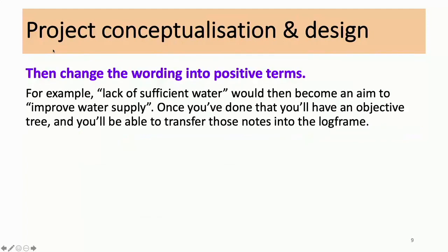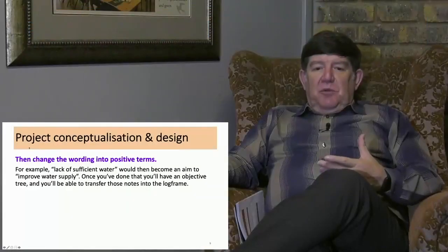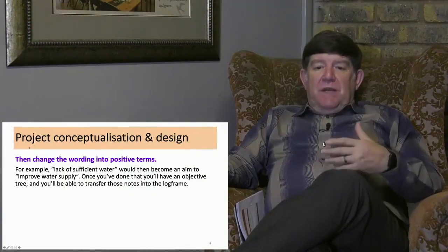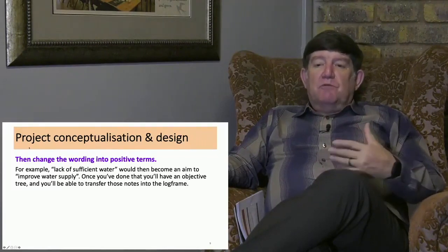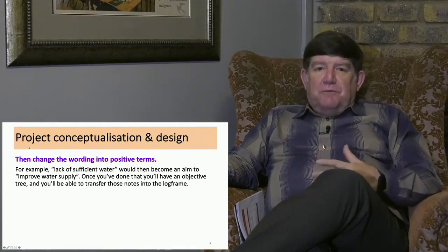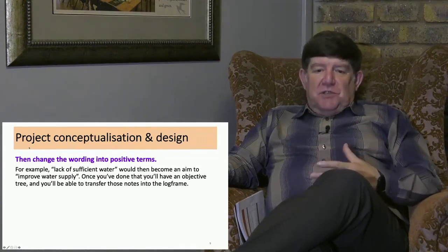Then change the wording into positive terms. You have now started with a problem which is generally negatively formulated. For example, if your problem was lack of sufficient water, it would then become an aim to improve water supply. What is your project about? It's solving the problem. So we need to formulate it in a constructive, positive way.